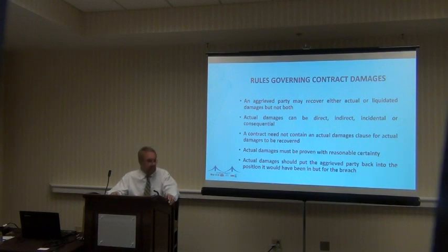Well, now, if the damages in question are a time-related thing, I was using the furnace and the fire as just an illustration of damages per se, more broadly stated. The time element of damage, not getting the job done by a specific date, that can either be the subject of actual damages or liquidated damages, but not both. I don't know if I answered your question.